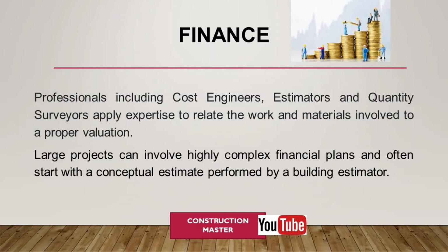Such problems may arise even when the overall budget is adequate, presenting a temporary issue. Cost overruns with government projects have occurred when the contractor identified change orders or project changes that increased costs, which are not subject to competition from other firms as they have already been eliminated from consideration after the initial bid. Fraud is also an occasional construction issue.